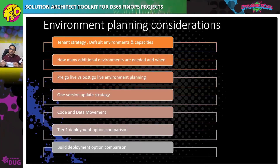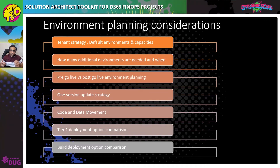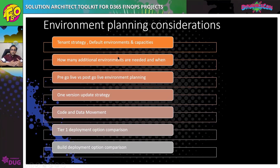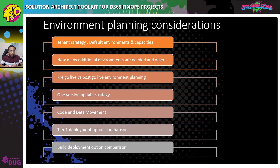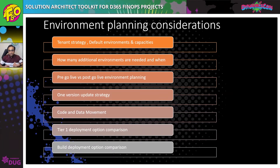Let's talk about environment planning, which is very important because it starts from the beginning of the project and is a discussion that happens at every stage, as it involves both cost and strategy. During early phases, talk about the tenant strategy. What I have seen is that some companies realize towards the end of the project, just before go-live, that they need a non-production tenant. You should also understand what default environments you get when you buy a Dynamics 365 subscription and what capacities — such as Dataverse, Power Platform, or Azure storage — are included.